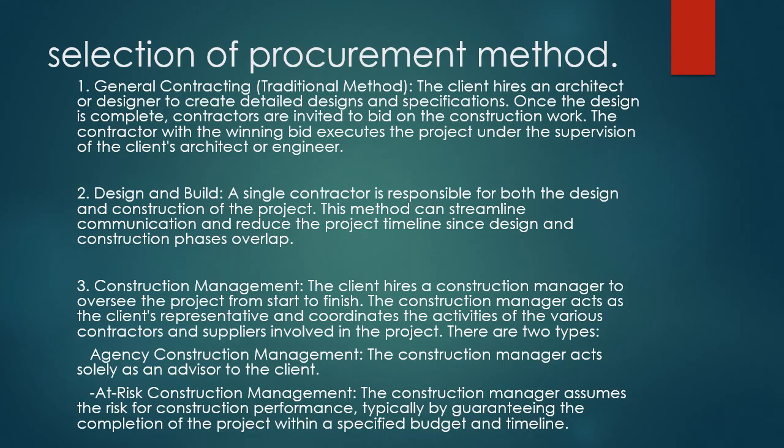Number 2, design and build. A single contractor is responsible for both the design and construction of the project. This method can streamline communication and reduce the project timeline since design and construction phases overlap.